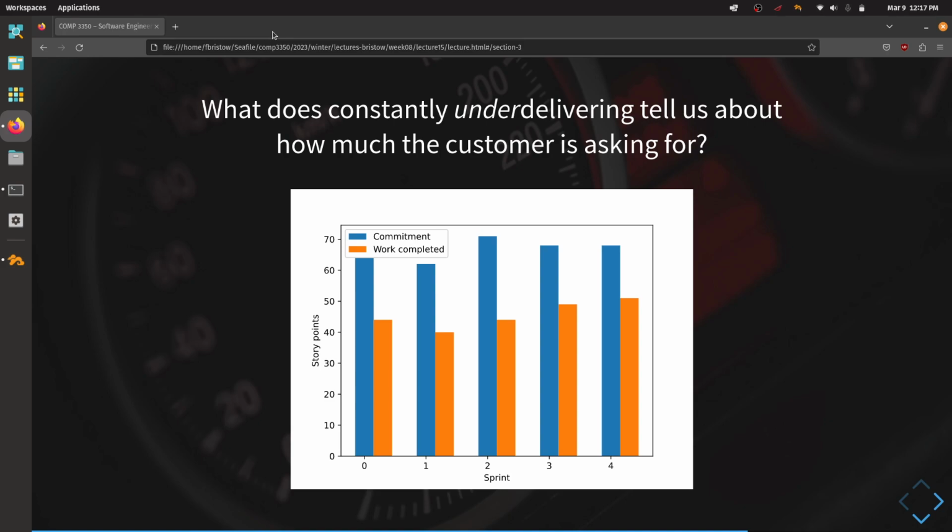You, as project managers for your projects, when you get a chart that looks kind of like that going up, it's time to start reevaluating how much you're actually committing to and changing the plan. It is okay to change the plan.